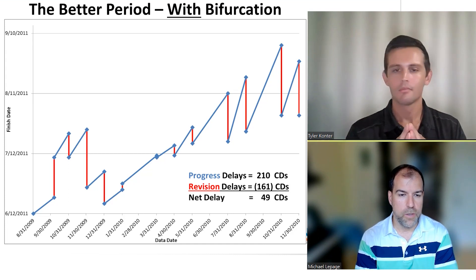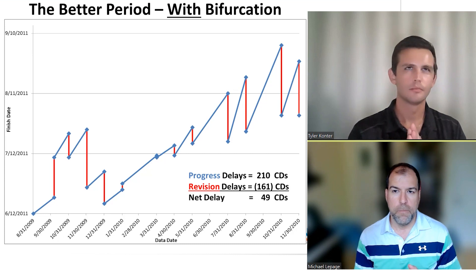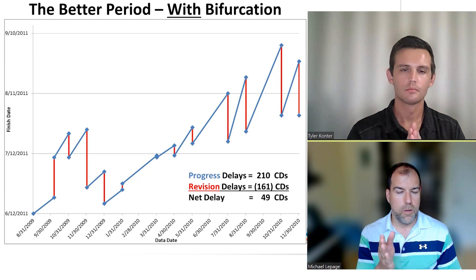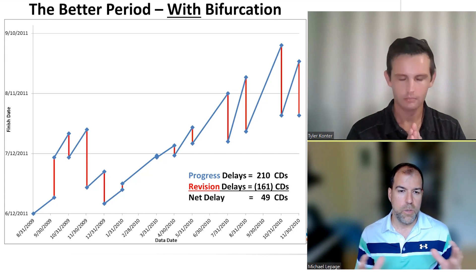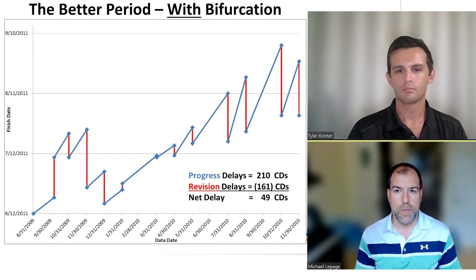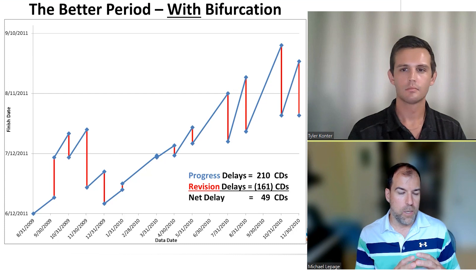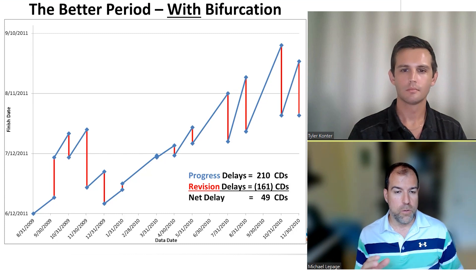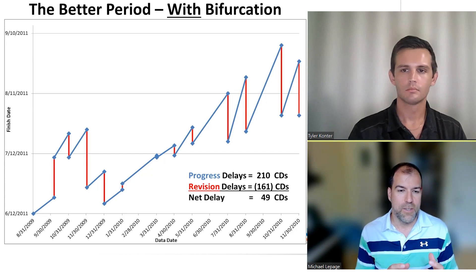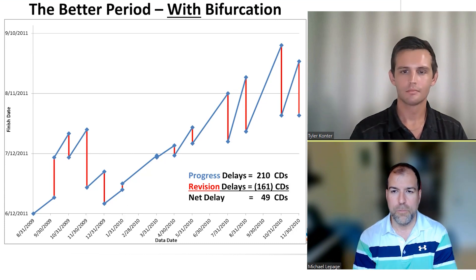I think of those revision delays as what I'd call squeezing the project. We're trying to find time so that we can report our finish date closer to where it should be. We're squeezing the project — taking any buffers that we might have had out, fast-tracking things where we probably can't actually fast-track them in the field. So we had 210 days of progress delay — bad progress, losing 210 days in the schedule — and to compensate, we then squeezed another 161 days out of the schedule. It seems like it's just a bad situation all around.